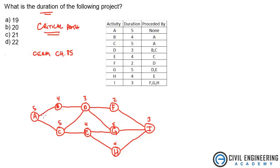And I can tell right off the bat if we go from A, C, E, I'm just going to choose a route that looks long. So A, C, E, G, I. That adds up to 22.